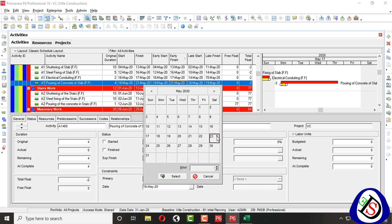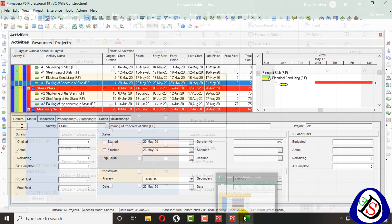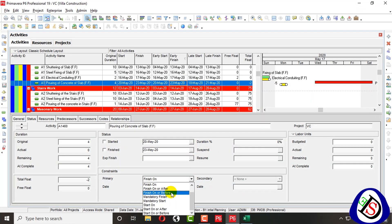When I plus the duration using Finish On, Early Finish will be affected and moves forward. For example, Finish On two days forward — 23 May — when I schedule it, you can see Early Finish is moved forward and the overall project finish is also affected at 23 May. No Late Finish is affected — only Early Finish moves forward.